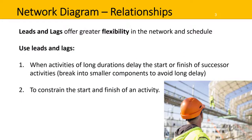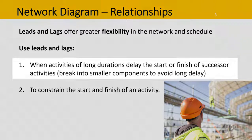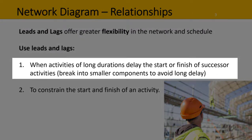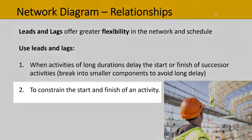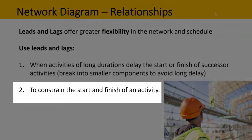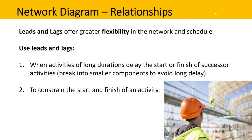In project management, sometimes it's also useful to use leads and lags in a project schedule. These add greater flexibility and there are two instances where they are handy. The first is when activities of long durations delay the start or finish of successor activities, so you might want to break into smaller components to avoid long delays. And number two, to constrain the start and finish of an activity.